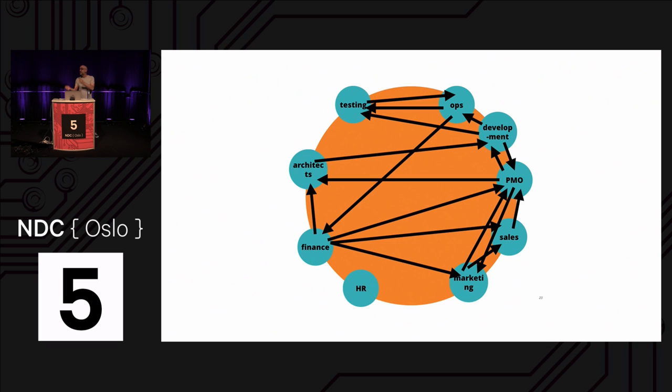It then gets handed over to testing. Testers do some testing. That's kind of what testers do. And then throw it back because bugs, defects, and you never thought about this, and the users don't like it anyway. And it goes back and forth, until eventually it goes into the queue to be deployed into production. And that queue is a release train that takes 26 weeks. So you wait another 26 weeks, at which point you've lost all that money that you could have had if you'd optimized your process. That's kind of what these chords represent, work being handed off between different groups in an organization.